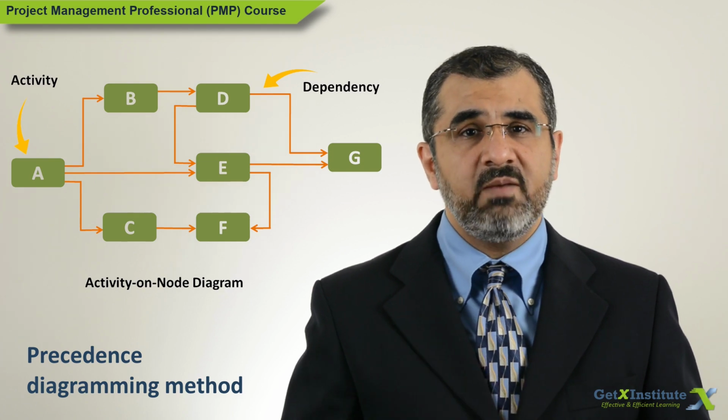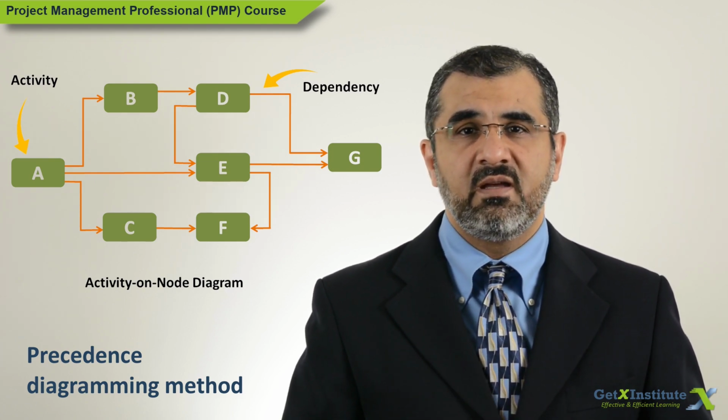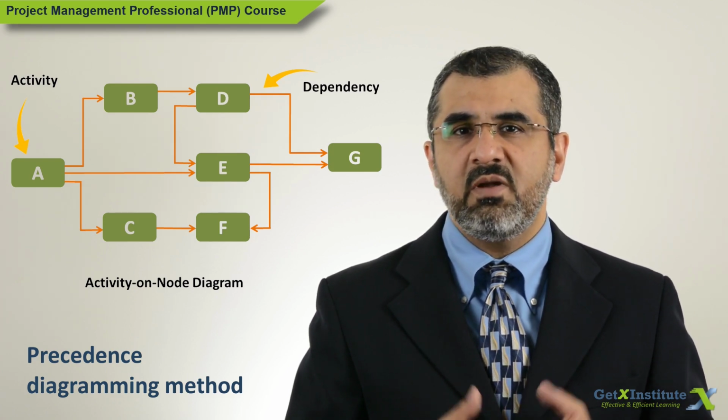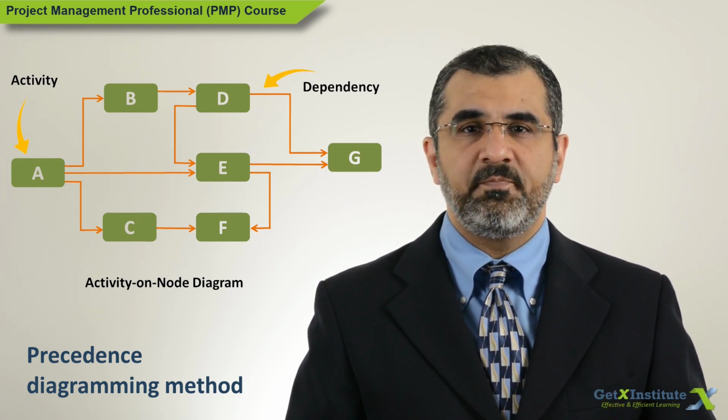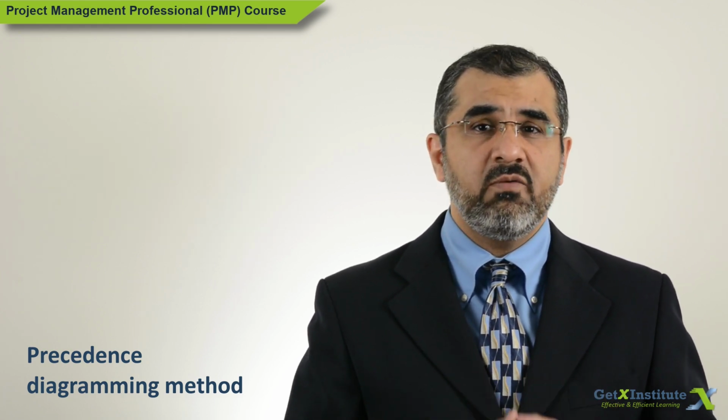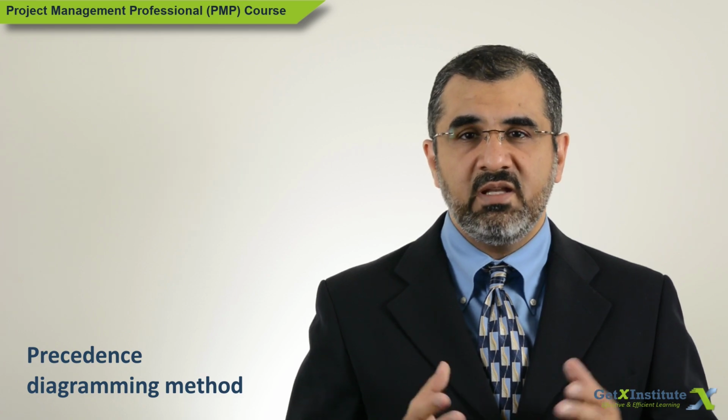So be careful when printing PDM for your project. It contains abundant information but may not be suitable as a presentation material. Otherwise, it is an excellent way of sequencing project activities and building the network diagram.